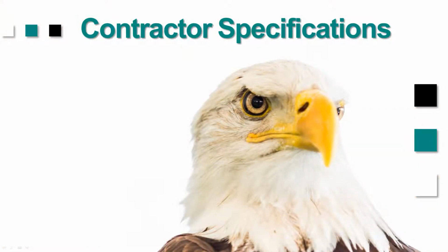Also at DOT, we required our contractors to provide some mandatory specifications when they submitted their schedules. The only way that we were able to check those was by importing that into our database and actually checking to see if they were there. We would have to sort and things like that to make sure that those values that they used, if they did have those mandatory specifications in, were valid.